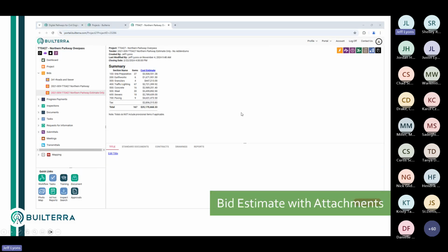So once you start building this out, you'll have an engineer's estimate at the end of it using historic bids and tenders data. And so this is downloaded to a spreadsheet. You can review it. When you're happy, you can give the package to procurement. So what does that look like? If we go to the next slide,